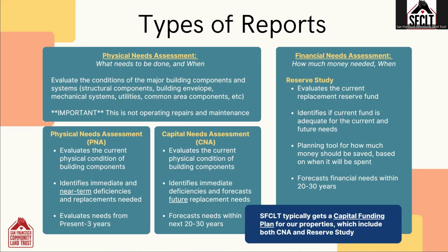When it comes to financial need assessments, we're talking specifically about a reserve study, which in short is how much money is needed and when. A reserve study evaluates the current replacement reserve fund and compares it against your CNA. It identifies if your current reserve fund is adequate for the current and future replacement needs of your property. It's a planning tool to help guide how much money should be saved based on when it needs to be spent. And it's forecasting your financial needs for the next 20 to 30 years.